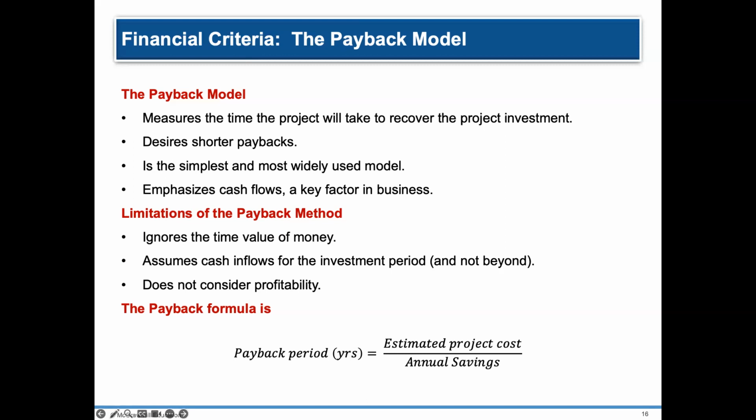The error rather is that the payback model does not consider the time value of money. So the payback model only focuses on the nominal amount of cash that is going to be spent and is expected to receive by the company.